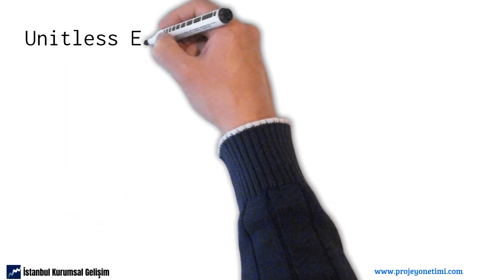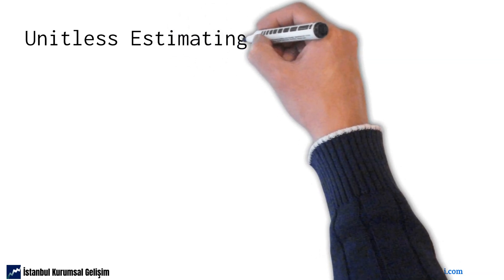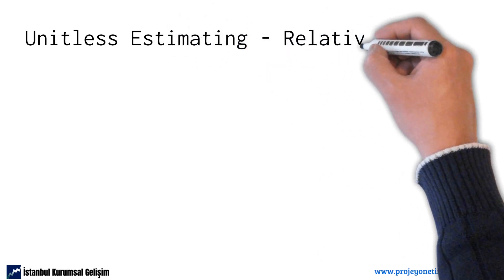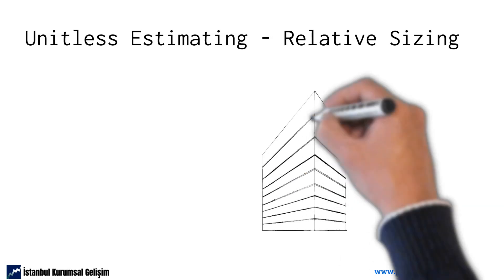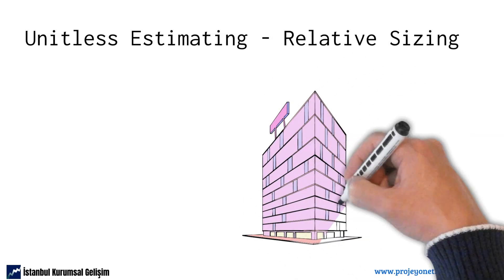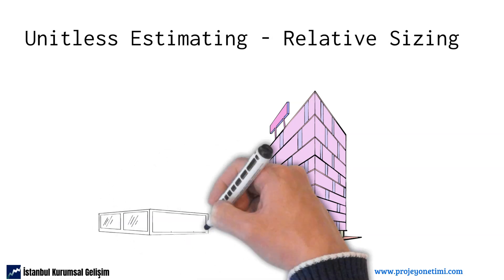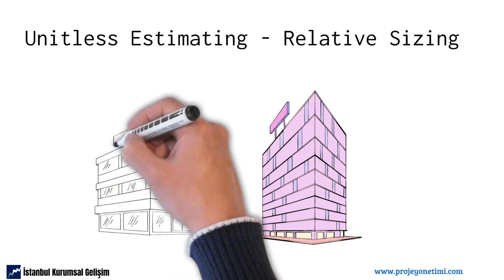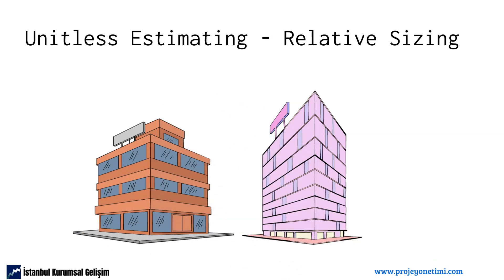Estimations are made on unitless values in the Scrum approach — in other words, the relative size approach is taken as a basis. Let's explain with a simple example. When you look at a large building, it is very difficult to tell how many floors it has. Rather, it is much easier to compare two buildings and tell which one is bigger. This is called relative sizing.